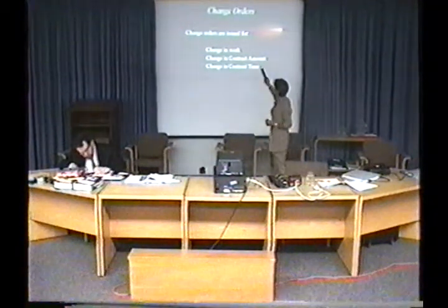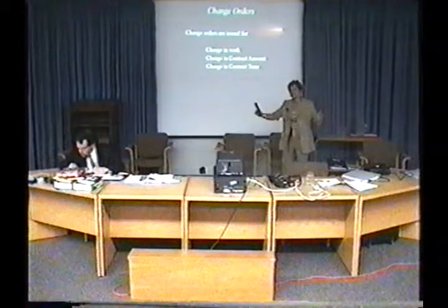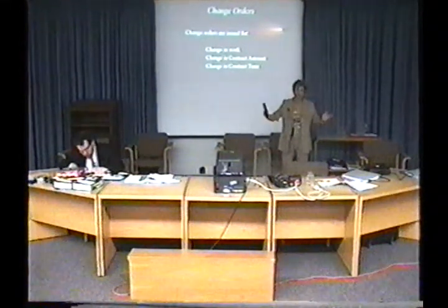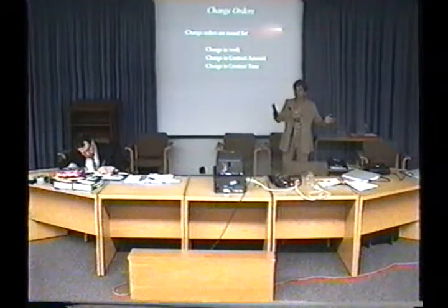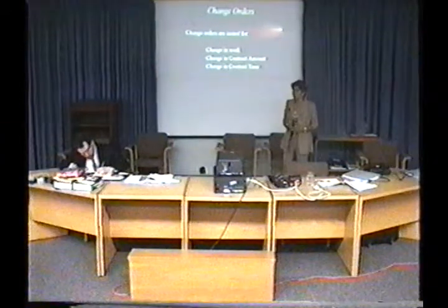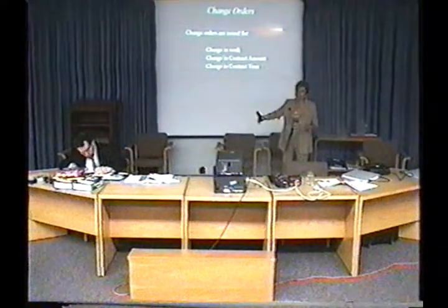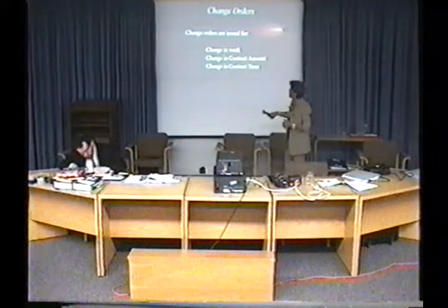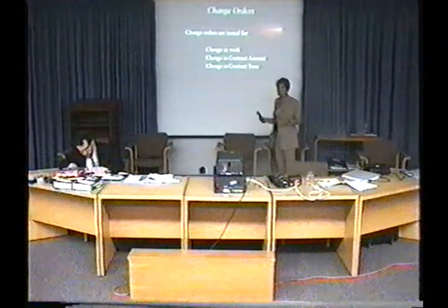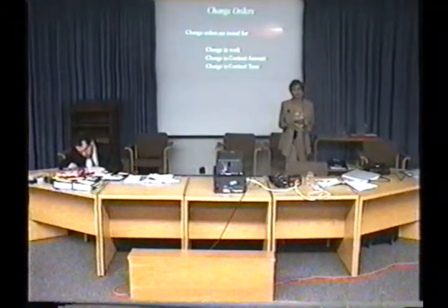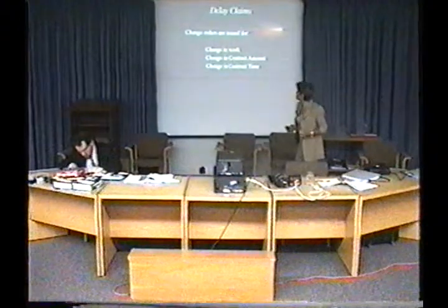The contract amount may increase because you're extending the amount of work. You were supposed to build 1 kilometer of roadway for the place you were requesting, and now it has gone to 1.2. How that amount gets calculated matters, and also the contract time, depending on what type of work is coming.